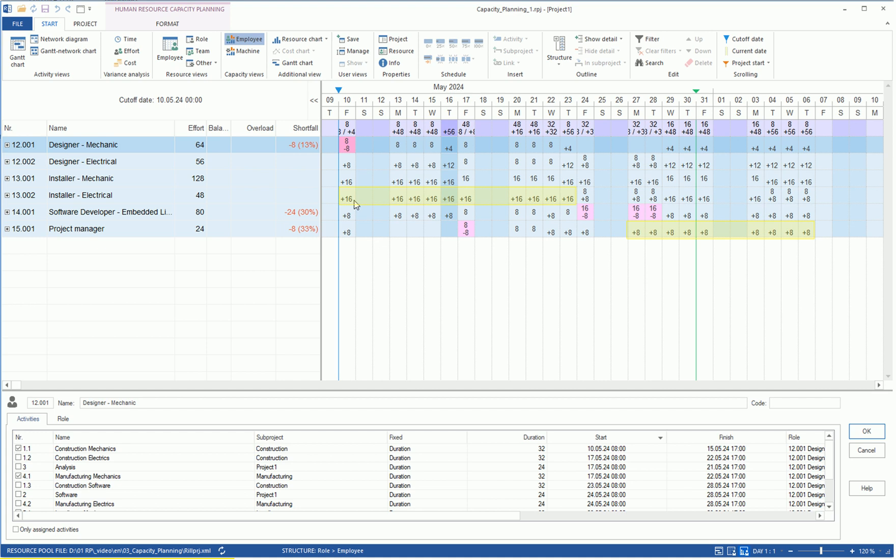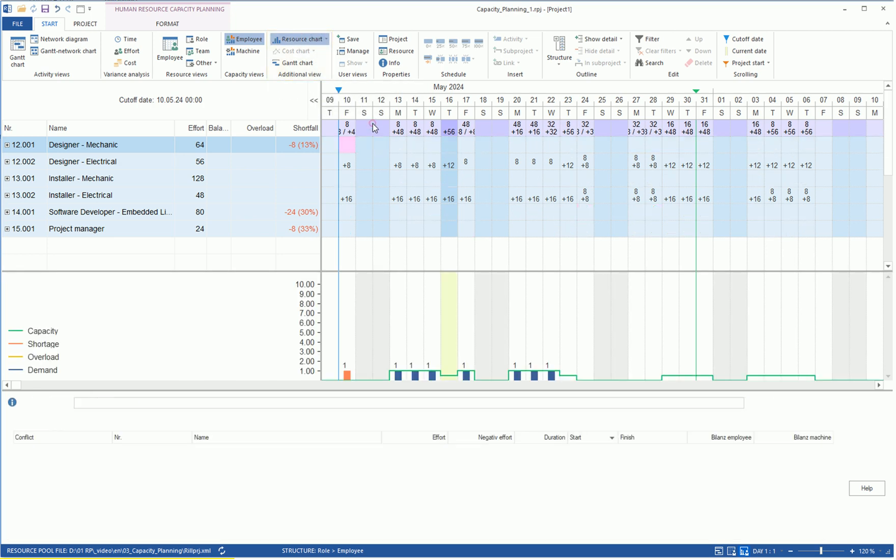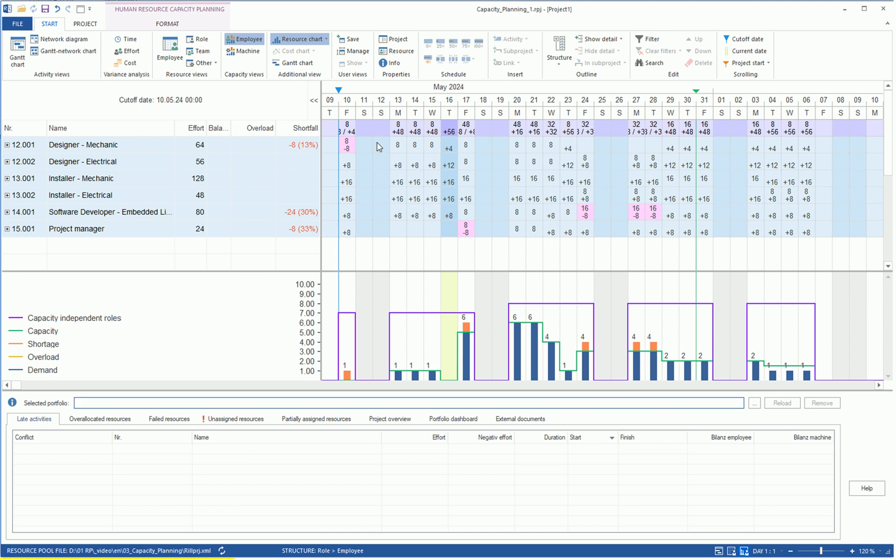Should employees not be deployable at a point in time because their roles are not needed, this over-coverage is displayed in blue color as a positive amount. We can also have the capacity matching displayed graphically by selecting the resource diagram in the Start, Additional View area. When we click on the purple line at the top, the resource diagram shows the summed values of resource demand and work capacity on the calendar scale.